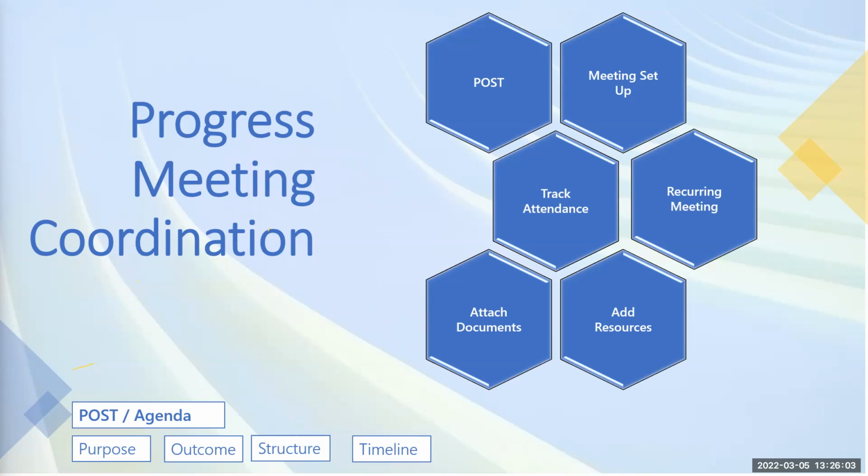They'll say, oh, there's a clash, or I'm away, or something. But for the people that haven't responded, if those people are key people, then that might be giving you the thought of what you should do, in terms of, do we need to cancel this session? Because these are the key people that need to make those decisions in the meeting. The ones that have not responded, you need to be checking with them to make sure that they will be in attendance.